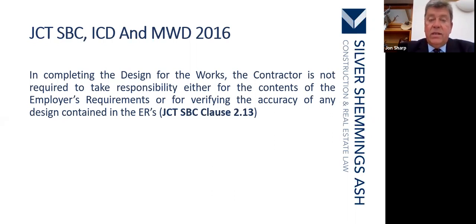In completing the design for the works, the contractor is not required to take responsibility either for the contents of any employer's requirements or for verifying the accuracy of any design contained in the employer's requirements. That's JCT, SBC, clause 2.13.